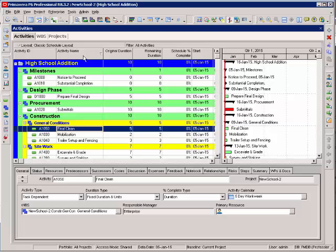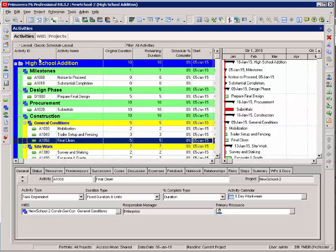if I have the activity name selected or the start date selected, it will sort by that column. If you want to keep them in the order as you're entering them, select the activity ID since your ID is being automatically generated to develop numerically.